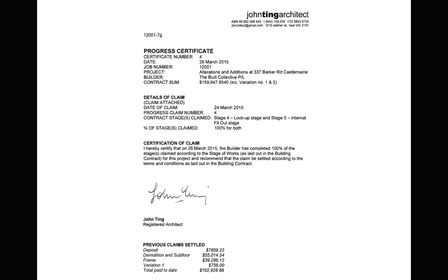And still, the Bendigo Bank would take 11 to 12 days to actually release the money to the client, and then the client would transfer it to the builder, which would take another 2 days. So really, really cutting short there. So next time I'd probably say 3 weeks, and just get the builder to charge us the overdraft to hang on to that.